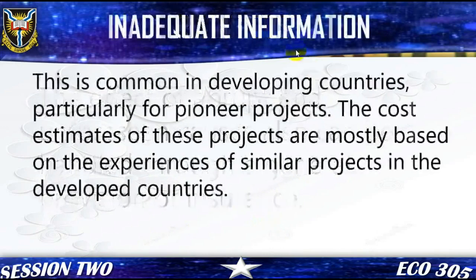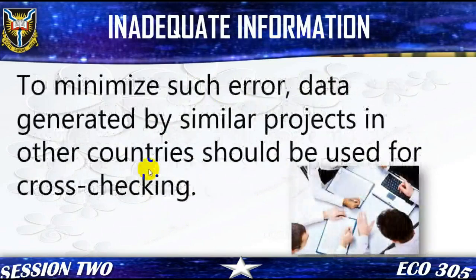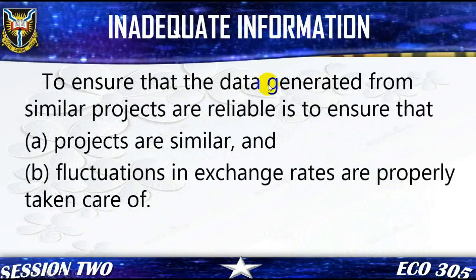2. Inadequate information. This is common in developing countries, particularly for pioneer projects. The cost estimates of these projects are mostly based on the experiences of similar projects in the developed countries. To minimize such error, data generated by similar projects in other countries should be used for cross-checking. To ensure that the data generated from similar projects are reliable, ensure that A. Projects are similar, and B. Fluctuations in exchange rates are properly taken care of.